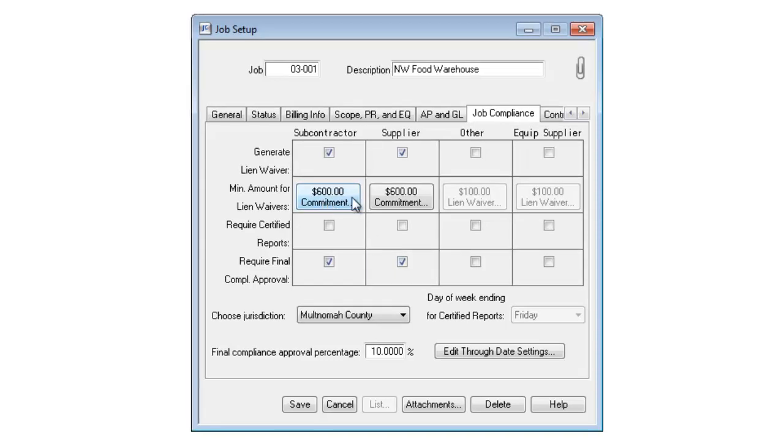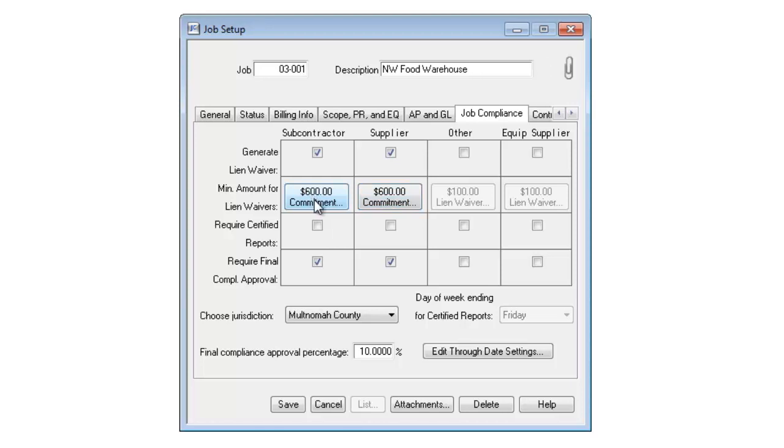If I have a minimum commitment amount before I want it to start generating lien waivers, in this case, a vendor needs to have a commitment with me of over $600 before it will generate lien waivers for me.